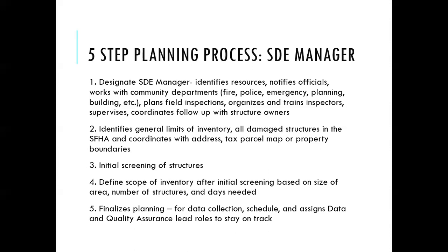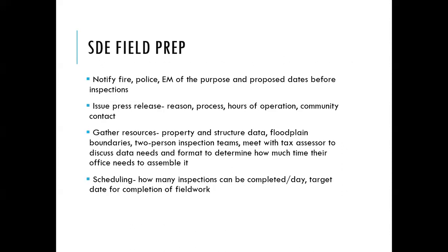So you finalize that plan, you set up your teams, you have your plan for data collection. So this team is going to go out on this day and collect information for these specific structures, making sure that they're trained on how to do that, get that schedule together, and then hopefully you'll have someone that can assist you with the actual software, doing data and quality assurance and making sure that everyone stays on track. So you definitely want someone double checking your work before you issue the assessments, just to look for any missing information or any needed corrections.